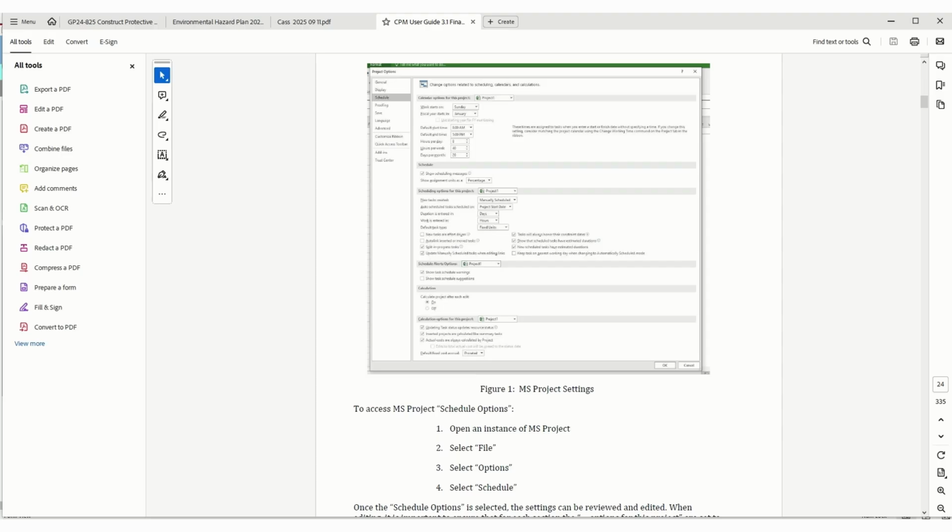Control measures. Okay, so how are we going to do this? How's the forms going to stay in as a control measure? Right, so we just put that formwork will stay secured until test results meet the required strength.